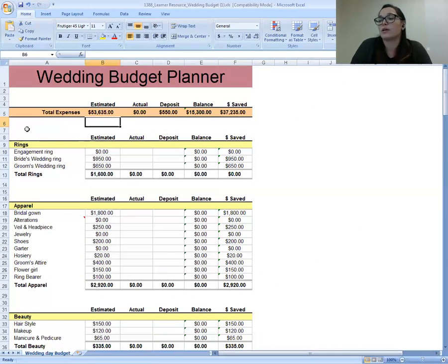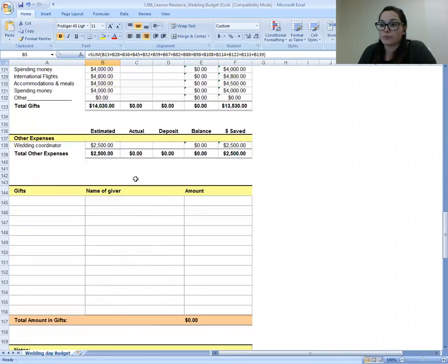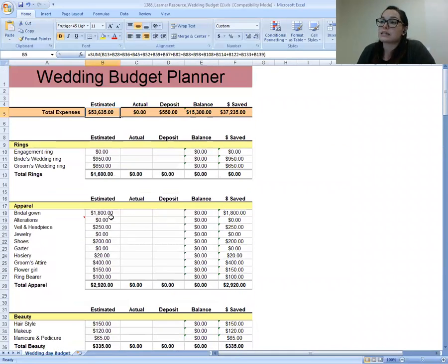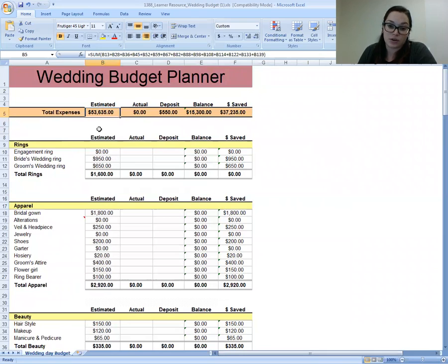Perfect. When you have completed those, you also want to make sure that you're updating this very top number up here. If the food costs extra, or if you're adding in extra lines at the bottom for your transfers and accommodation, you want to make sure that this estimated total up the top has come up or down, whatever you're doing. They're still at the budget of $60,000. If you're going to go over it, you really want to justify why that's going over and show where that money is going. That's probably my number 1 tip for that section up there. Just make sure this one is updated, because otherwise it's not going to be in line with what you're updating.